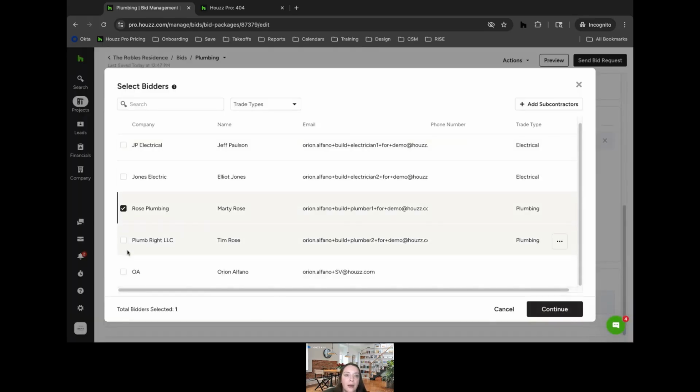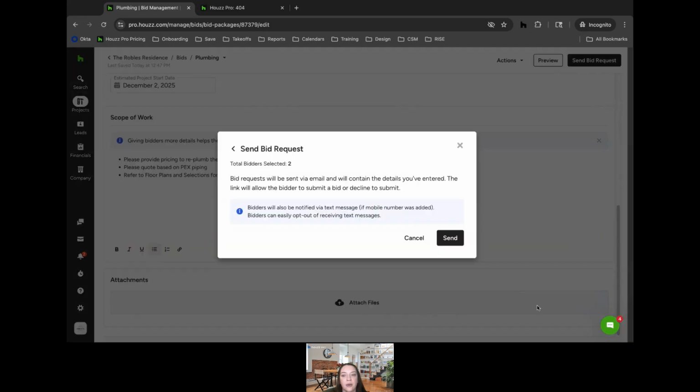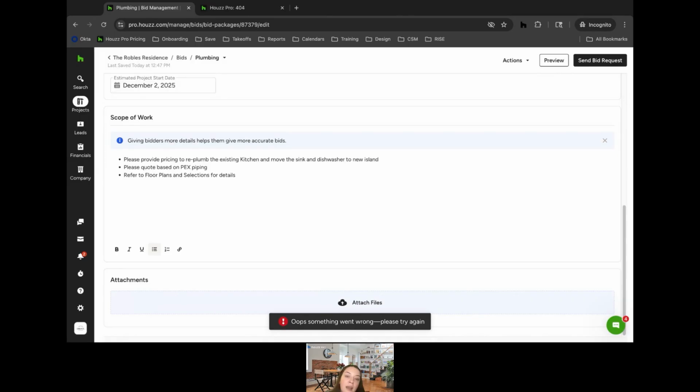I will add my 2 plumbing contractors in here, and then I'll go ahead and click Continue. I will send them this bid request. They will get it via email. Once they respond, I'll get notified, and then I can go ahead and either award the bid or decline the bid.